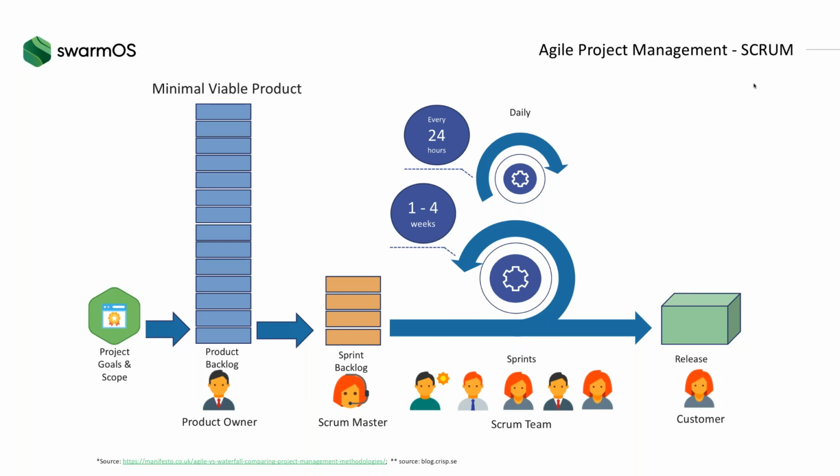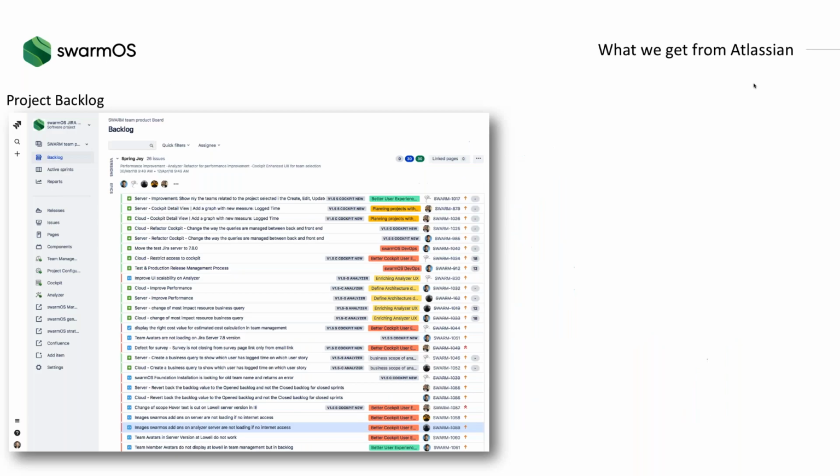And the other big difference is that you have more dependencies. For example, if you want to launch a marketing campaign, your software team probably needs to have a software product ready to release. Your support team needs to be ready to provide multi-language support. So you have dependencies between projects from a business perspective, which you won't face if you run a single software project. So dependencies do matter.